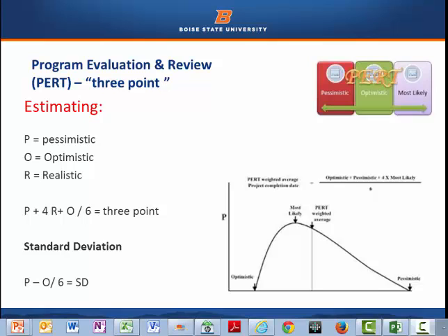If you see wide swings in your estimates and your standard deviation, that's usually a red flag to ask why somebody on the team thinks it's going to take longer or more or quicker or whatever. It's something for you to investigate. Let's go learn how to use the tools of 3-point estimate by using your workbook.